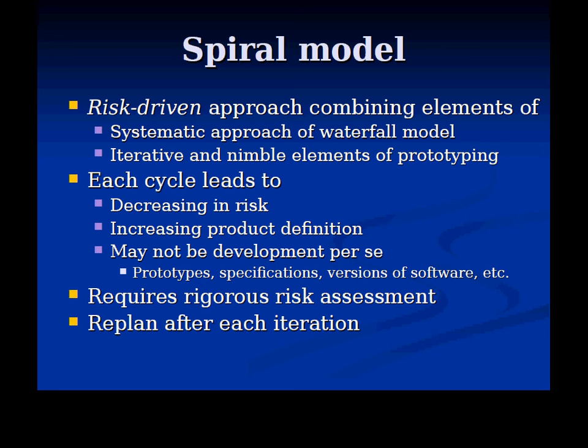How about another thing? Why do it in small pieces? Prioritize parts of the product. Some parts have higher risks. Good. Some parts have higher risks or higher priorities from the stakeholder perspective, higher needs, and you can get that value to them, and you can shrink those risks, right? You can take those risks, which are really broad, and collapse them. So is this technology you're thinking about betting on going to work, or is it not going to work? You head that off early on.